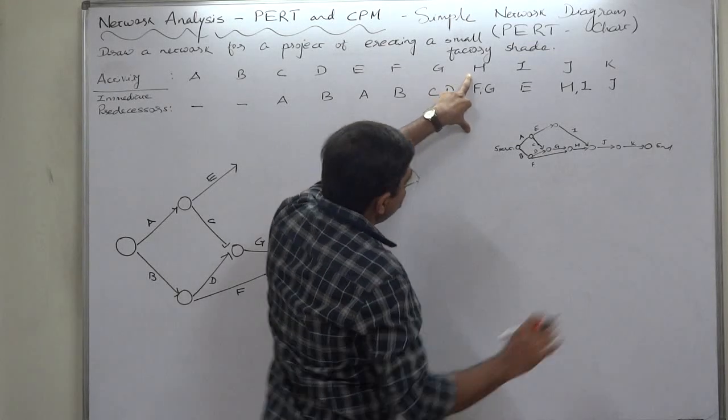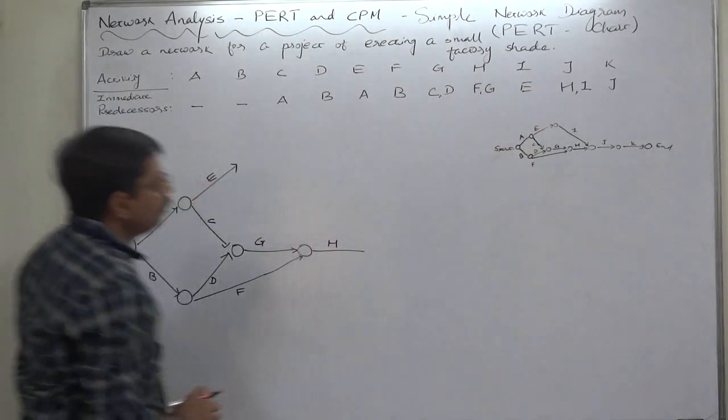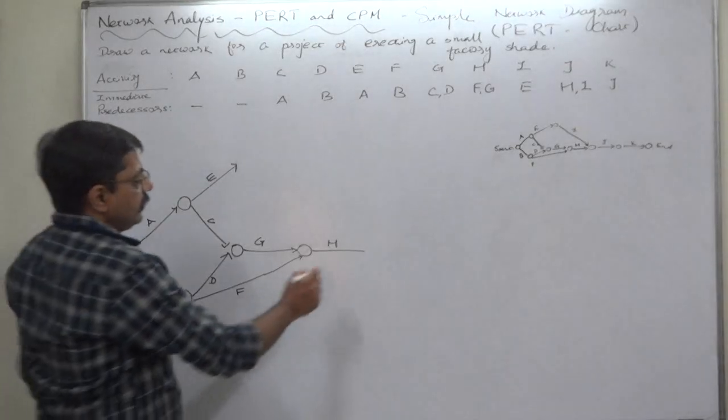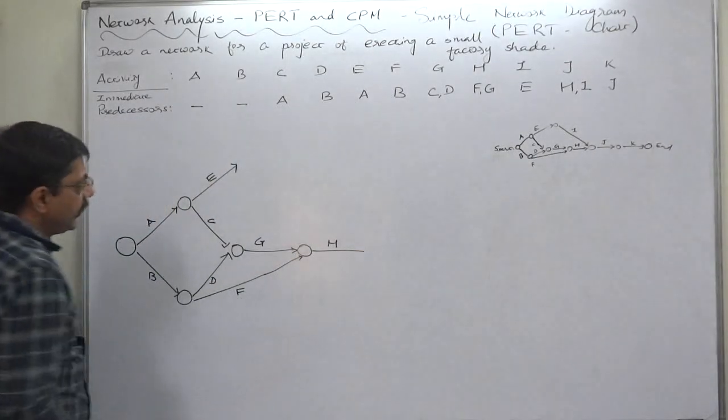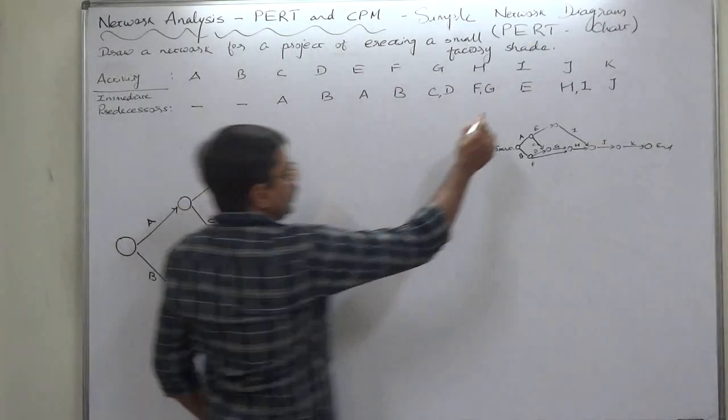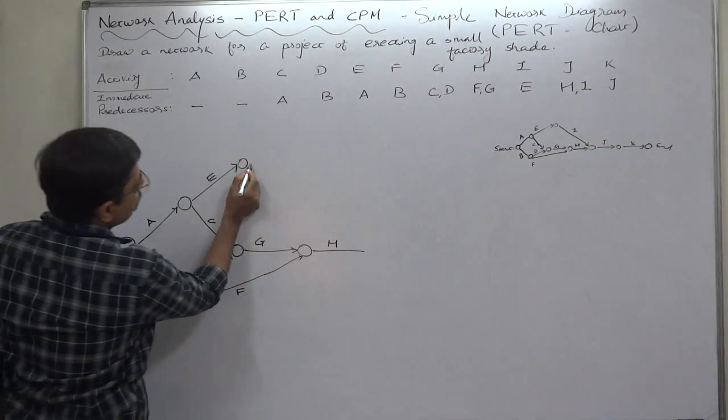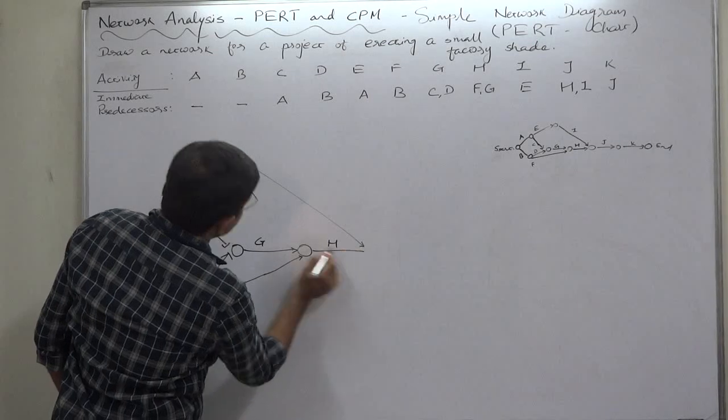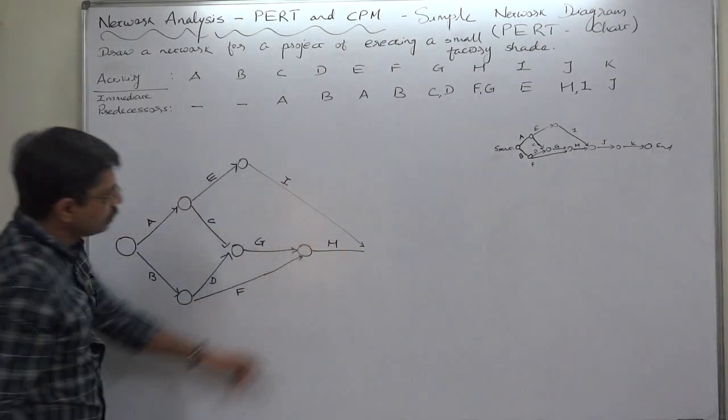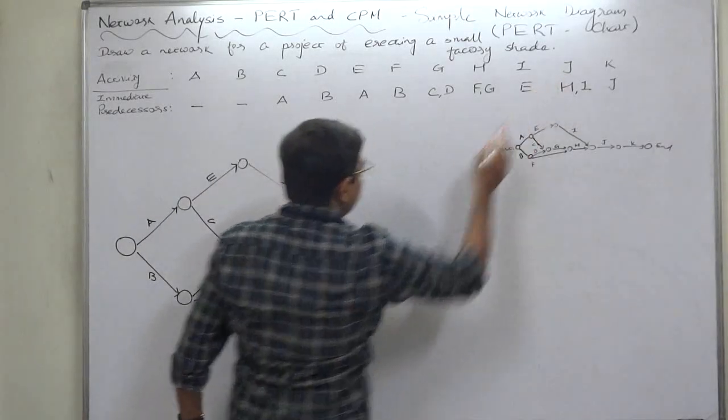Yes, only one—J—but together with I. So we need I before completing the arrow. The predecessor of I is E, that is here. So now we can draw an arrow something like this, because I and H both are common predecessors of activity J.